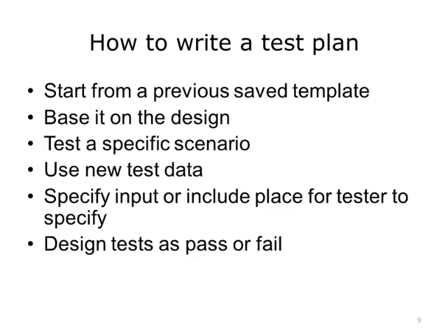Sometimes, testers like to reuse the same records used in prior tests and keep updating them. However, these records might be corrupted by failed tests. Ideally, you should start with new test patients and new test data. Design tests as pass or fail, so it is easy to determine if the test was successful.